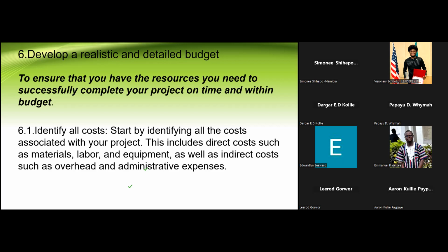effort, a certain percentage that goes to that person's salary as well, in addition to what the person already has. When it comes to reporting, the requirement is that the individual internally reports on each and every donor funding and donor costing, and you train your people. So that is how you can do it. Some organizations are strong, they want a very specific person. They don't want anyone who's dealing with another project because they are sensitive about their own funding.